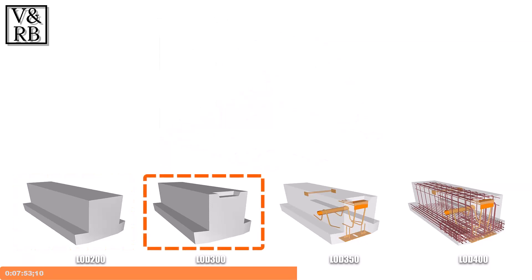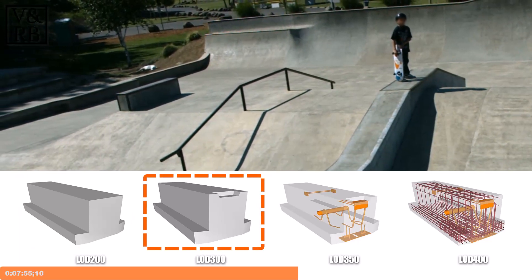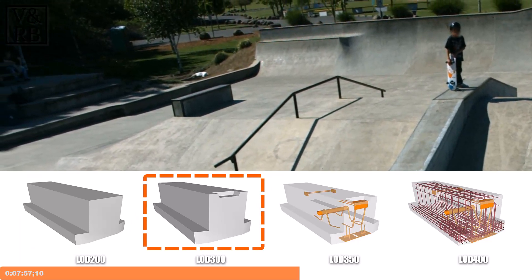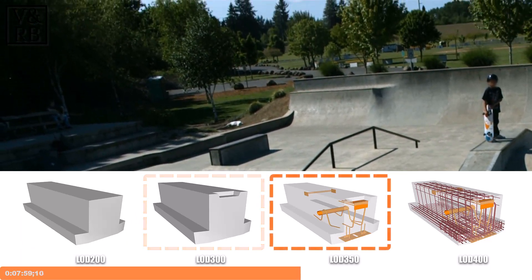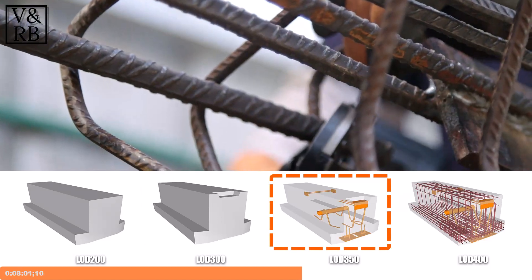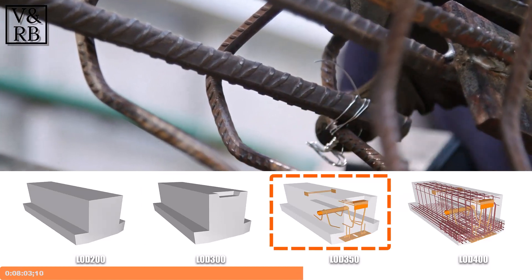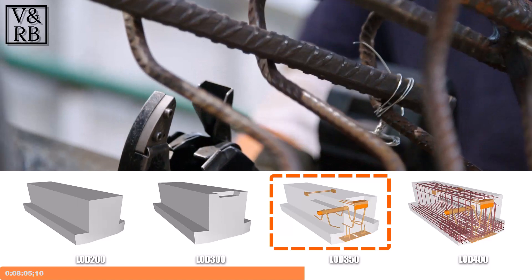LOD 300 requires the accurate size and specification of elements, including all sloping surfaces to be accurately modeled. LOD 350 includes the detail coordination of pour joints, expansion joints, embeds, and anchor rods.